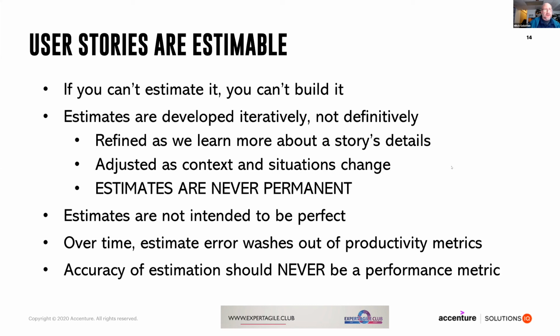Sorry about that. Estimates, we develop them iteratively. We don't sit down and then say, this is the estimate. We work on estimates. They are developed as the information about them develops. As we learn more about a story, we refine it, and we refine it, and we refine it. And the reason we do that is because we want to make these decisions at the last responsible moment, and we accept that we are never going to know everything that we need to know about a story.